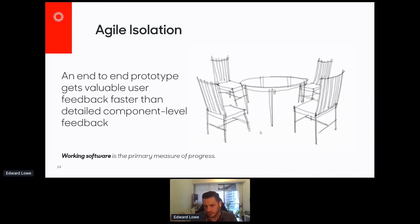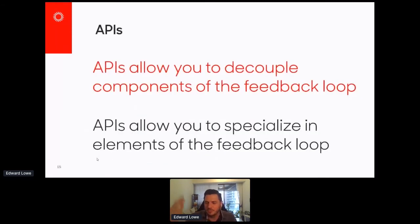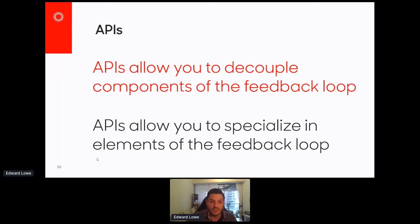My recommendation is: always have an end-to-end prototype or MVP — even if it's the ugliest sketch in the world — that gets user feedback at the whole product level. That's much more important than building out perfect components and then trying to join them together later. Calling back to the Agile Manifesto: working software is the primary measure of progress. It doesn't matter how simple it is, as long as it's working. Any complex software evolved from a piece of simple software that worked.